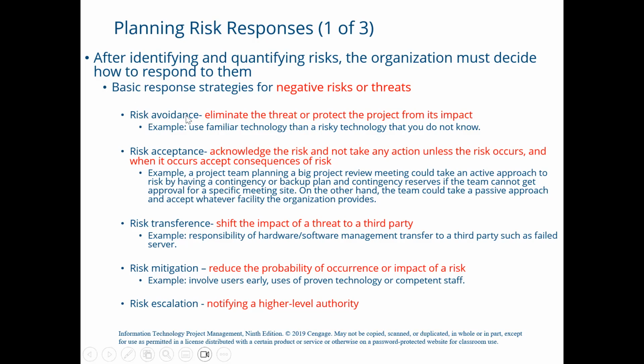Number 1, risk avoidance. Risk avoidance means eliminating the threat or protecting the project from its impact. For example, use familiar technology rather than a risky technology that you do not know. Second is risk acceptance, which means acknowledging the risk and not taking any action unless the risk occurs, and when it occurs, accepting the consequences of the risk.